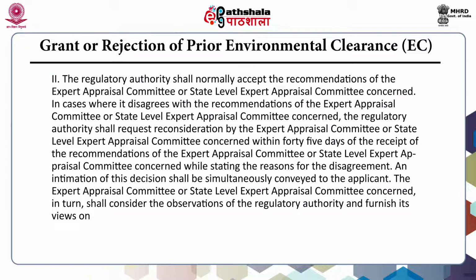In cases where it disagrees with the recommendations of the expert appraisal committee or state level expert appraisal committee concerned, the regulatory authority should request reconsideration by the expert appraisal committee or state level expert appraisal committee concerned within 45 days of the receipt of recommendations, while stating the reasons for the disagreement.